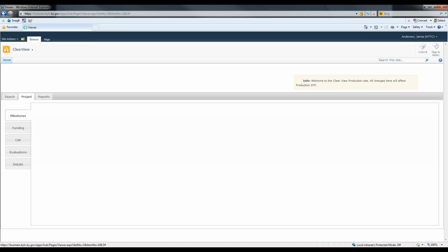So, for example, if a consultant has recently submitted a monthly report and final roadway plans delivery has been delayed, this is when you'll need to go into Clearview and update the scheduled completion date for the roadway plans. Also, I want to make a note that when you update your schedule, you'll always need to put in a remark. Those are required for the changes to save.